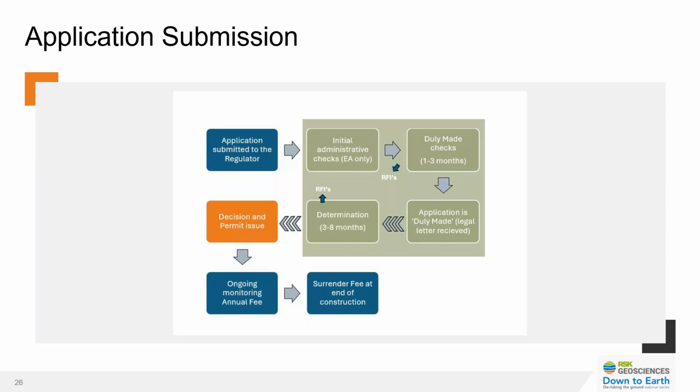So because it's designed to rectify minor errors, there are relatively strict time conditions imposed on us when it comes to responding to RFIs, and generally they're required within 5 working days. If we don't reply within the allotted time, then this will lead to the application being returned, and 10% of the application fee that's been paid by the client will be retained by the regulator.